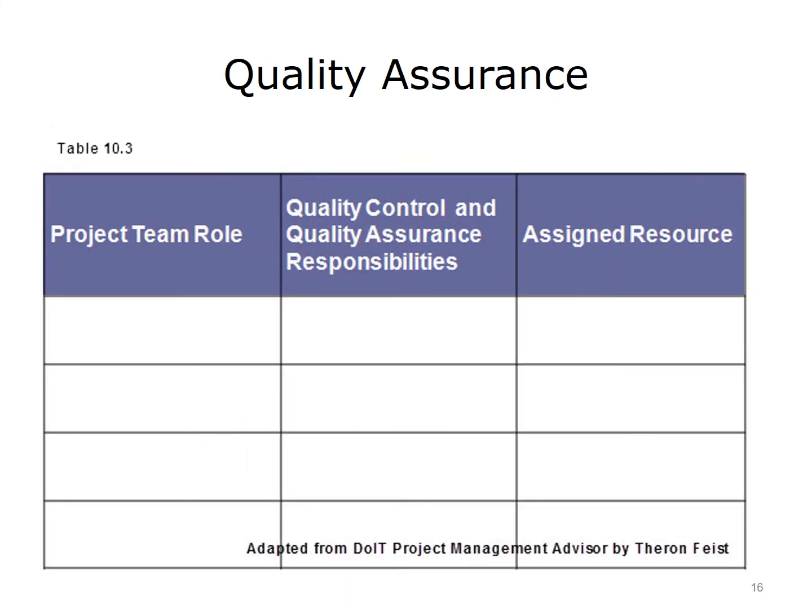Quality assurance activities examine project processes and workflows to assess their abilities in meeting a project's planned outcomes. The table on this slide breaks out each process to undergo quality assurance, the standards and requirements regarding quality assurance for that process, the activity, which might be an audit or evaluation, that will assess if that process is correctly performed, and the frequency of that assessment.